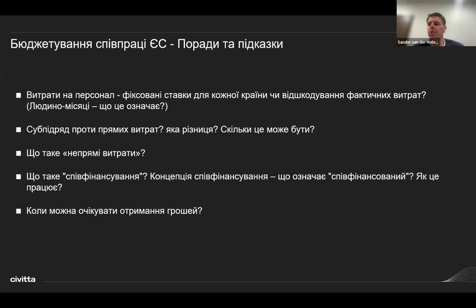Direct costs are typically the costs you incur while implementing an action. And this could mean you need some printing costs, you need to rent a car, you need to book a flight, you need to have a hotel, a conference room, you need to hire a projector, you need to create a roll-up. Actual costs that you as an organization incur, that you pay for other organizations or ordering goods. It could be services, it could be goods. But you're in charge of doing the activity yourself. You just need help from a catering, help from a conference room, other external support.